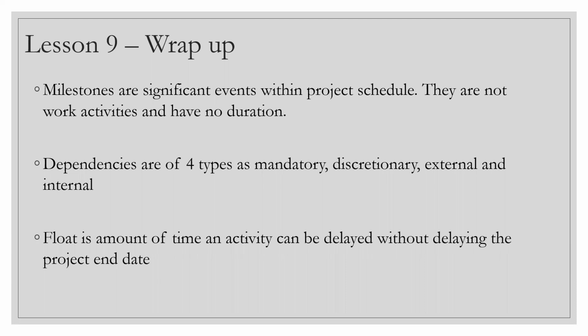Just remember it. In the exam you will not get a direct question like this, but know that if asked what is the duration of a milestone, your answer will be 0. A milestone does not have any duration. Milestones are durationless. They are just a flag, a marker that we have achieved so much of the task, maybe 30% of the project. So we have reached milestone 1, which is great. But saying milestone 1 is equal to 45 hours of work is an absolutely wrong approach. A milestone has no duration.